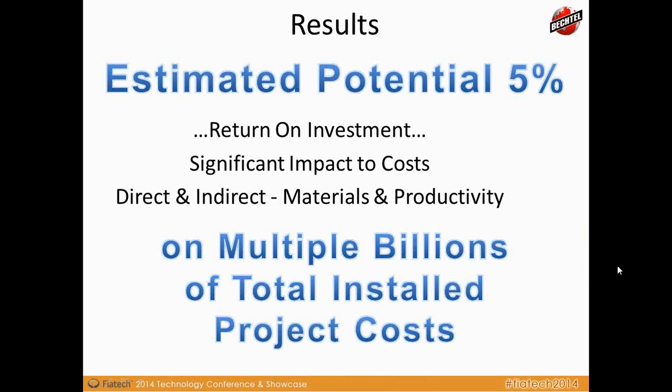I'll let you imagine this a little bit, but we knew from the early pilot that we talked about in 2008 that, for those 20,000 RFID tags that we talked about, we could probably locate the materials about 8 times faster than using the manual processes that we've seen today. And in turn, our overall craft productivity could be increased by about 4 or 5%.